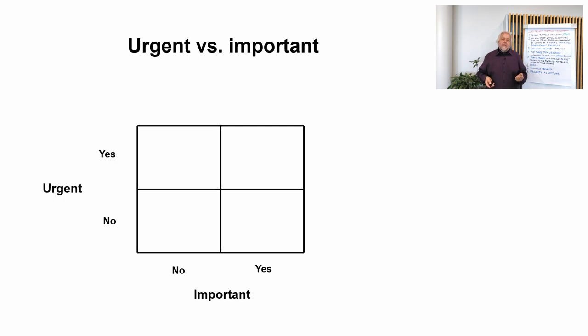The question of whether a project or project idea is urgent or important, or both, or neither, is interesting. So, is it urgent? Yes or no? Is it important? Yes or no? If it is urgent, then probably it will be done anyway. Also, important things are done, but if that is not important, well, it is done still, but there is not much loss, maybe a little bit too much cost invested in a certain not important thing, but still it is done. But the problematic spot in this picture is those projects or project ideas that are non-urgent but important.